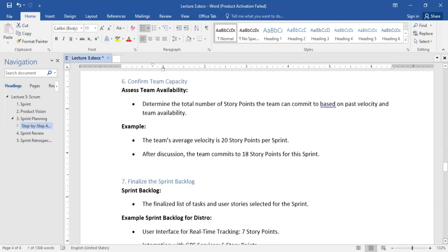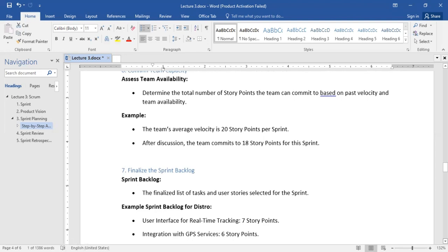from past events that it takes your developers, designers and testers 20 days to complete one particular feature. A combination of user stories gives birth to an epic, and a combination of epics gives birth to features or functionality. You discover that it takes 20 story points per sprint, which means your team can commit to 20 story points. So what you now do is break it down to 18 story points.